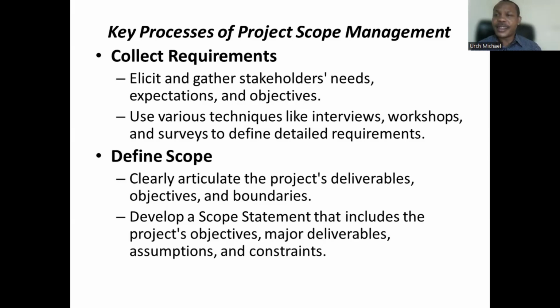What are the assumptions in this project? When we talk about assumptions, you're talking about, is there a possibility that we might not meet the deadline of the project? What could be the economic situation of the country, the social situation, the terrain, the atmospheric condition at the time that we want to carry out the project? Based on that, you should be able to draw up some assumptions. Maybe you tell us that we might not be able to meet our schedule because this period is the rainy season. So you have to look at all that and put assumptions together.